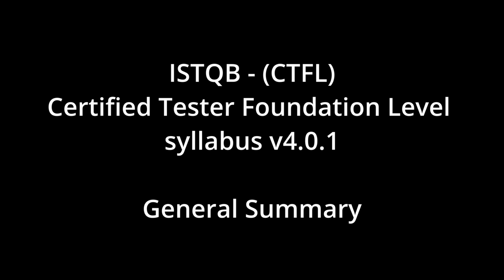Another is making inaccurate estimates of the considerable time, cost, and effort required not just to purchase a tool, but to implement, integrate, and crucially maintain the automation framework and test scripts over time. Automation isn't a one-off cost. Insufficient budget, time, or skills within the team to develop and maintain robust automation is a common failure point. There's also the risk of becoming overly reliant on a specific tool or vendor lock-in. Integration challenges with the application under test or other tools in the environment can be complex.